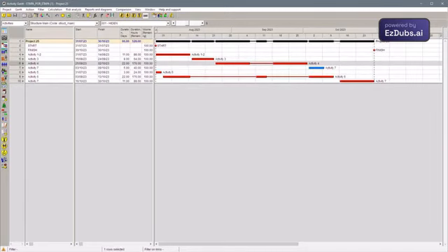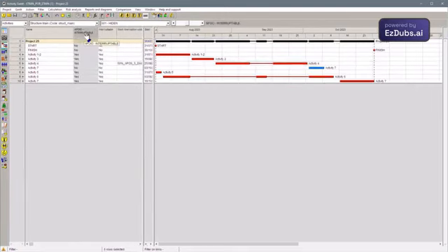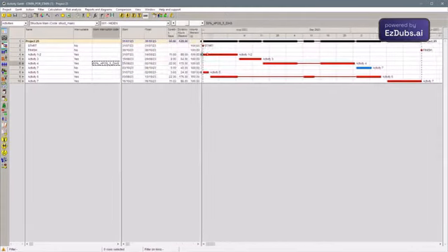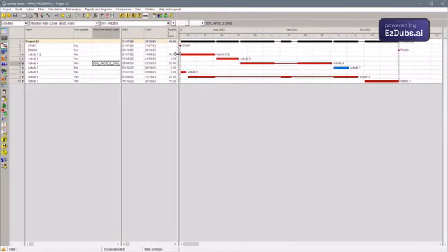These columns that I'm going to show help to understand these resources, not the support column, but the interrupt column, whether or not the activity can be interrupted automatically, to improve search optimization by the algorithm. And the scheduled shutdown, which I illustrated the name of the shutdown with 50% after it continues for 5 days. I believe that this way we can illustrate the 2 resources of the tool, in the same way that it manages to show that the CPM methodology, even with infinite financial resources, would not be able to manage when it comes to rare or unique equipment for use in a project.